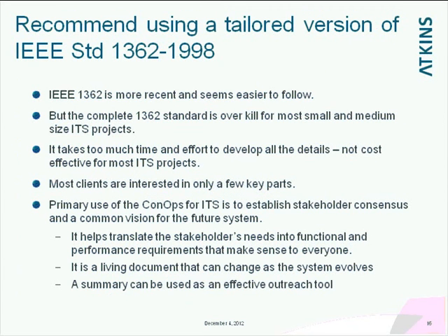Now, I recommend personally using a tailored version of the 1362 standard right now. It's more recent than the older one, and it seems easier to follow. But I think if you apply the entire standard to a project, it'll be overkill for most small to medium-sized projects, especially in the business field that we work in, the intelligent transportation systems. And also, ConOps takes a lot of time to write and a lot of effort, and it gets expensive. And it's not always the most cost-effective for most ITS projects to do a full-blown ConOps. Most of the clients, by the way, are interested in only a few key parts of it anyway.